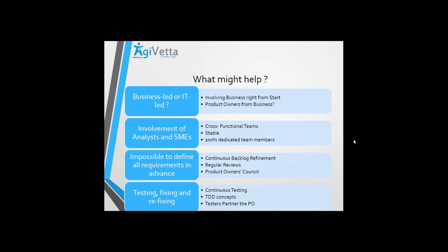In fact, I want to go to the next slide, which will answer some more of those questions. Just to answer that question, Sandeep, that you asked, can automation play a more effective role in this kind of project? I'm not sure. It will actually depend on context to context. Will you be able to automate 100% or even 70%? That will really depend, because with data mining, for example, you cannot automate all the test cases, because if the data source changes, if the parameters change, you'll have to update your scripts, right? So your scripts might need to be changed continuously.